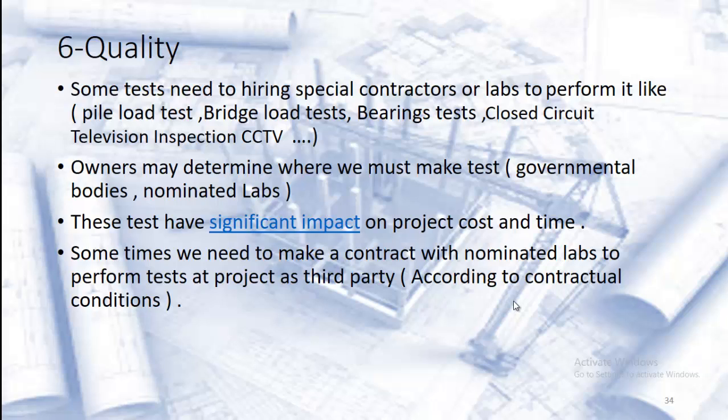Some tests need hiring special contractors or labs to perform them, like pile loading test, bridge loading test, bearing tests, closed circuit television inspection, CCTV, and others. Big tests require special contracts to arrange them.